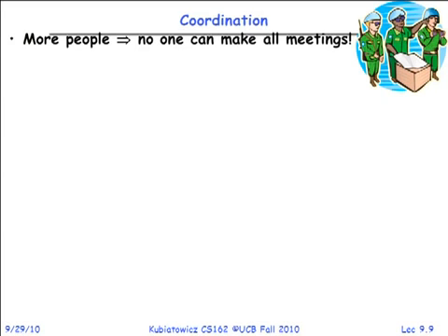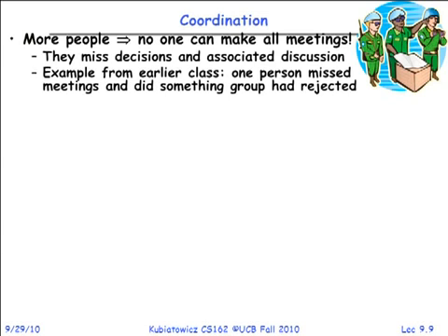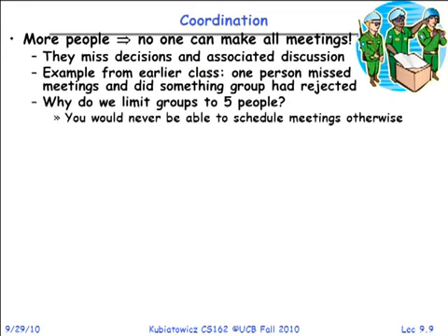And I will say that it's inevitable that you'll miss meetings, okay? That'll happen. It's okay. But an example of what happens when a meeting is missed is there was a time in the past where somebody decided to completely re-implement something in their own way, and this was a way that the rest of the group had gotten together and decided they weren't going to do, and as a result, you ended up with a bunch of wasted work and being behind schedule. So if you're going to miss meetings, you better have a really clean way of finding out what happened, like meeting minutes or something.